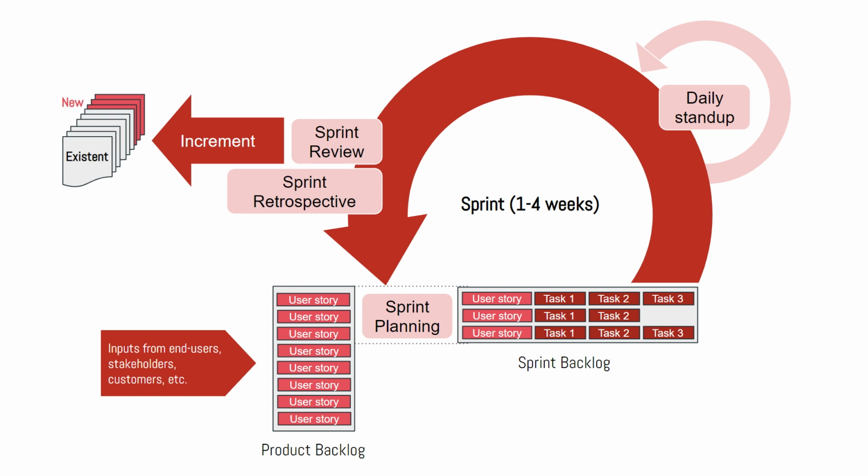And finally, after this event, there is a retrospective meeting. And during this meeting, the development team and the Scrum Master try to evaluate what took place during the sprint, if they did good, what they did wrong, how they could improve in the future. So this is a process-centric event. These are the sprint events. Then after the retrospective, starting again with the planning, daily stand-ups, a review and retrospective, and so on at every sprint.